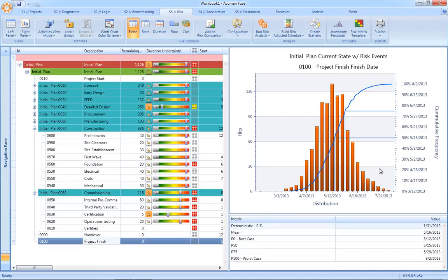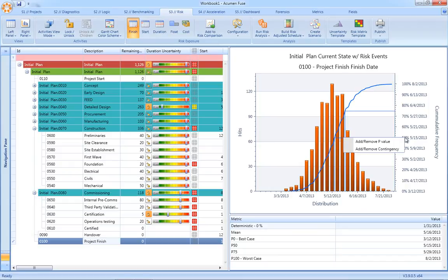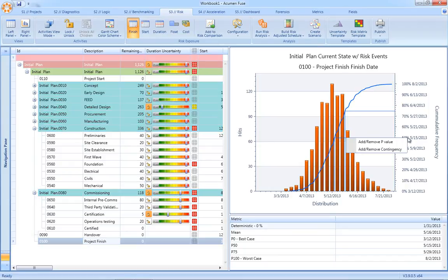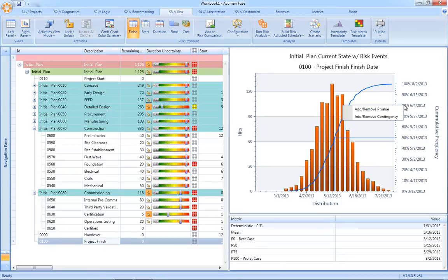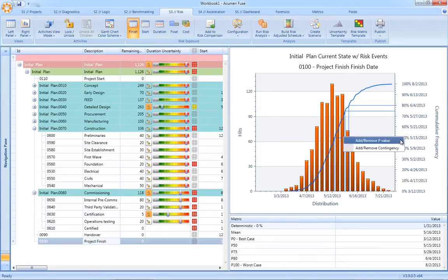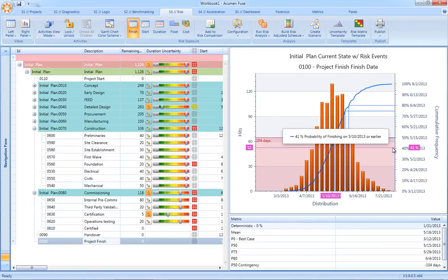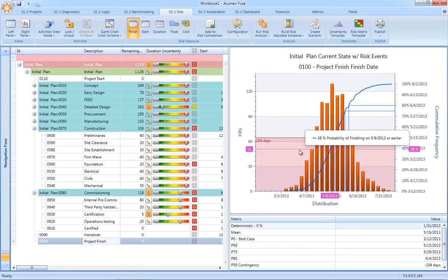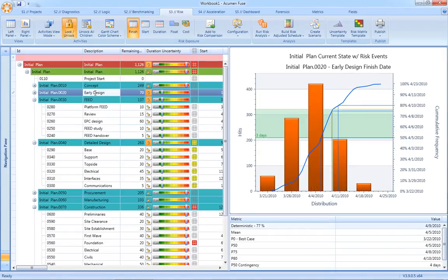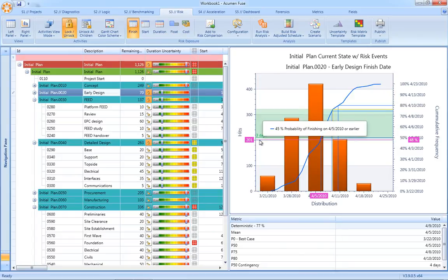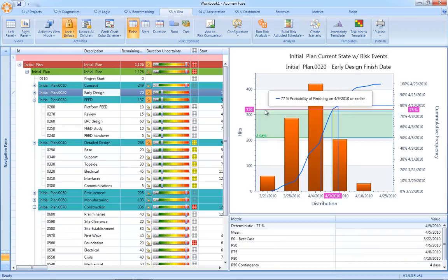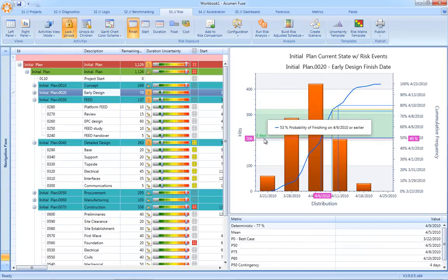We can also read off what we call p-values, an example being what is the date against which we have a 50% confidence in achieving. Additional p-values can be added to the report, and in a similar manner, contingency can immediately be seen simply by clicking on the chart. Acumen Risk not only reports where we need to apply contingency to our schedule, it also reports where we actually have too much duration built into the underlying schedule.